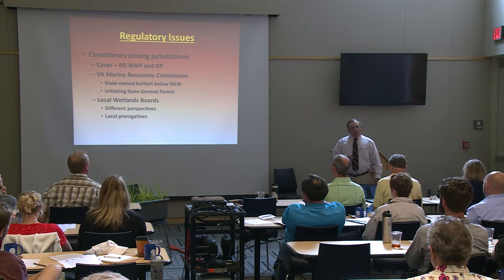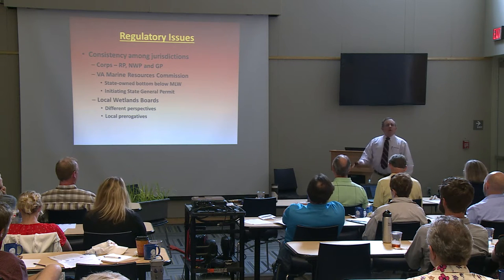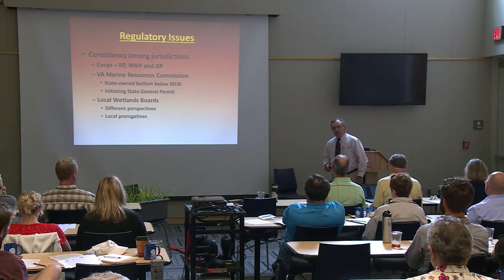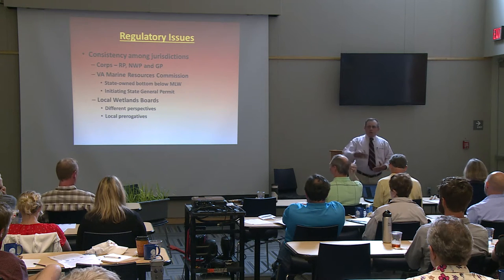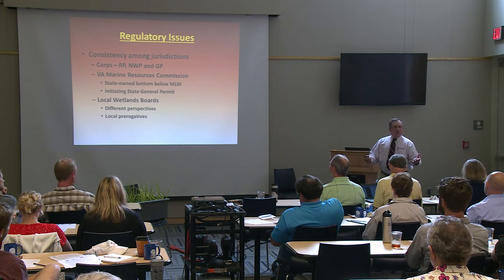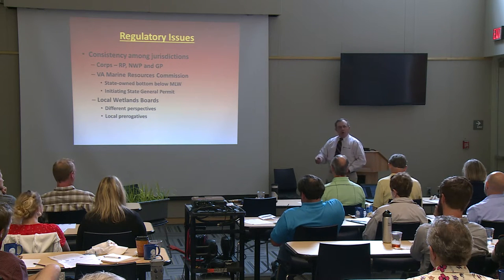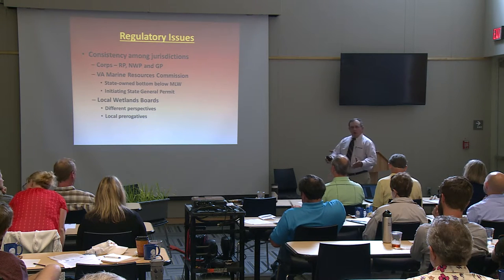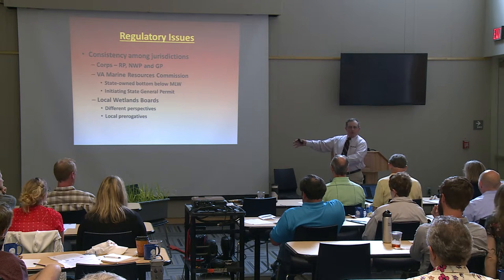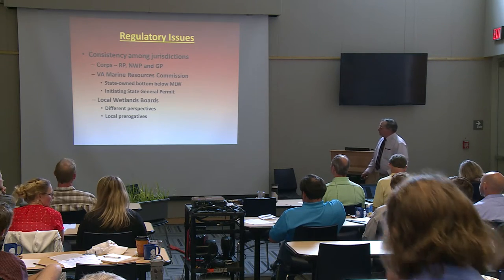Each locality in the state of Virginia, every county, city, town, has its own local wetlands board. Seven people appointed by the county supervisors. They receive the applications, they go out and look at the project, they evaluate it, they have a staff presentation, and they make the decision on whether to issue the permit from a local level. Because the wetlands are above the state's jurisdiction, they are the sole determinants of the wetlands issue from the state's perspective.